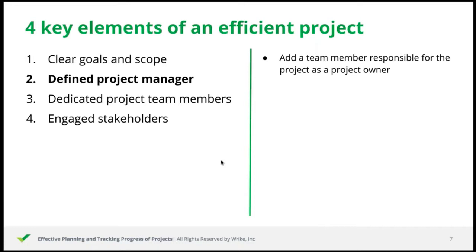in Wrike. A project owner in Wrike does not necessarily need to be the assignee of any of the tasks that are part of it, but it is often the case. We strongly recommend that each project should have only a single project owner. In case additional team members need to stay on top of what's going on with the project and all its actionable steps, add these team members as followers.